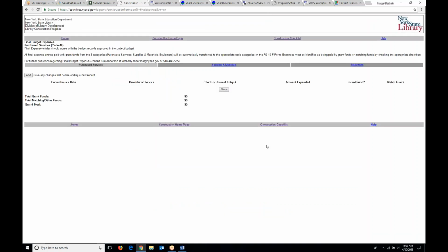Okay, budget final expenses. This is sort of the last thing I want to show you. As you're managing your construction project, it is important that you know when the check that you wrote to the contractor or vendor was written. That's going to be called your encumbrance date. So if I wrote you a check on July 1st, 2018 for a project, that's the encumbrance date.